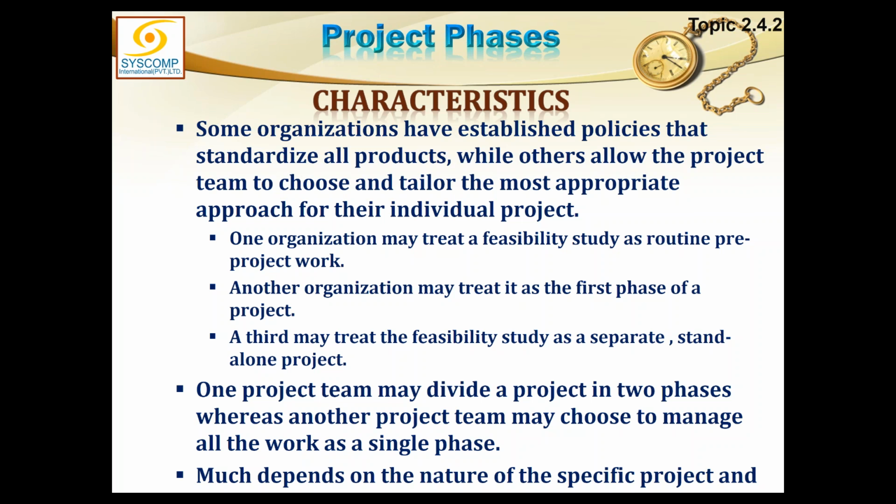Like it says, while others allow the project team to choose and tailor the most appropriate approaches for the individual projects. One organization may treat a feasibility study as routine pre-project work. Another organization may treat it as the first phase of the project. Another organization may treat the feasibility study as a separate standalone project. So this is just a way of looking at it. The complexity of feasibility might be so much that it could be treated as a separate project.